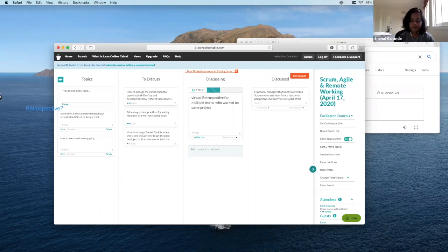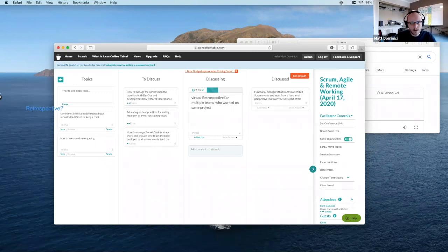Right. Okay. That webinar I was talking about, one of the people on the panel was actually Esther Derby. She's the one that wrote that book, Agile Retrospectives. And her take on that stuff was, yep, if you have any kind of quantifiable stuff that you need to gather, definitely do that before the session, so that you're not wasting time fiddling with the tools and collecting the data that way.